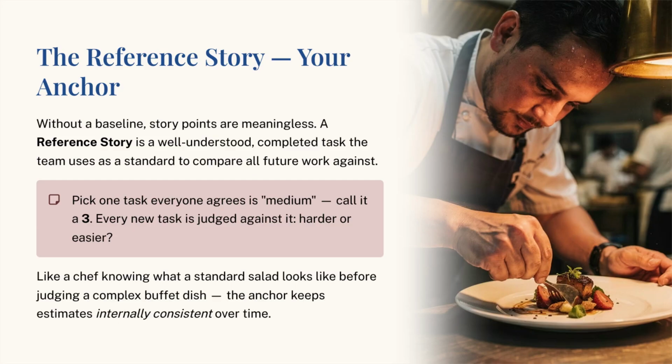You pick one task that everyone on the team agrees is a medium task. Let's call it a 3. And every time you estimate a new task, you ask, is this harder or easier than that 3? By keeping this anchor visible, you ensure that your estimates stay consistent over time. It doesn't matter if your points seem large or small compared to another team in the company. What matters is that your team remains internally consistent with itself. It provides the stability that turns estimation from a guess into a science.